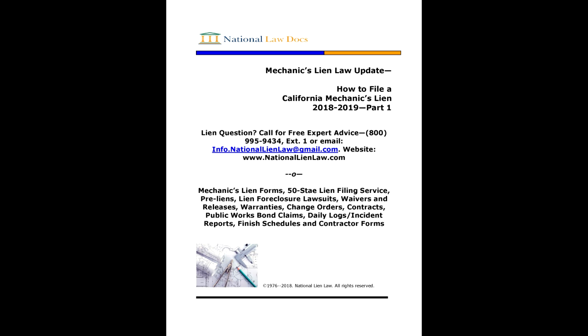As far as the amount of the mechanics lien, it's the labor, materials, and equipment actually furnished up to the time of the lien. Technically, the code indicates the reasonable value of which you have conferred, but in almost all cases it is based upon the contract amount furnished to date. But what if you've been terminated or have temporarily demobilized for non-payment? You don't get the balance of the contract or future lost profits, but only what you have conferred thus far. So if you have a $100,000 contract and you've been terminated after 80% complete, you only get $80,000 even if the other side has breached the contract.